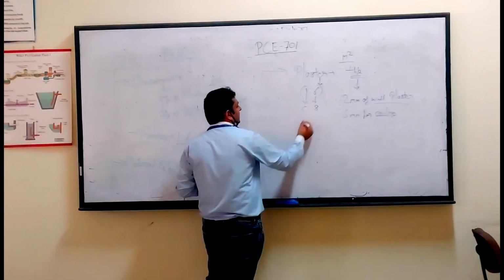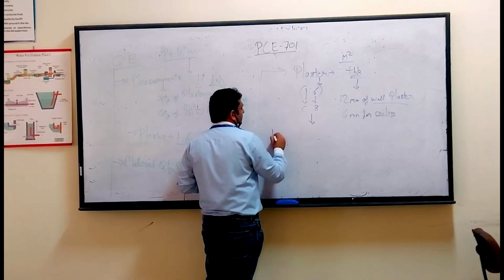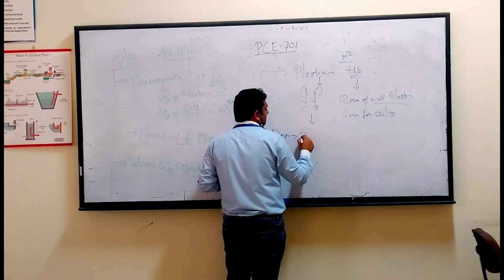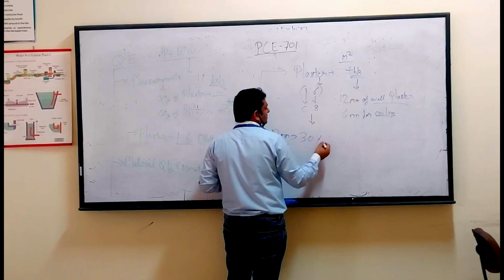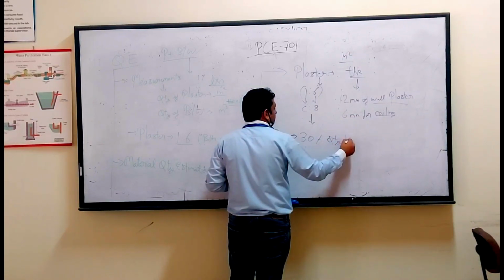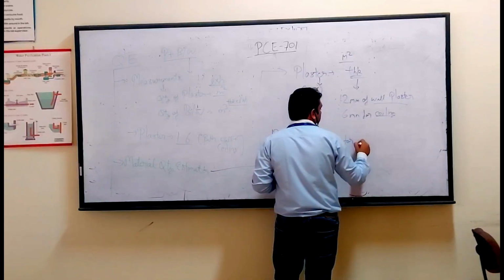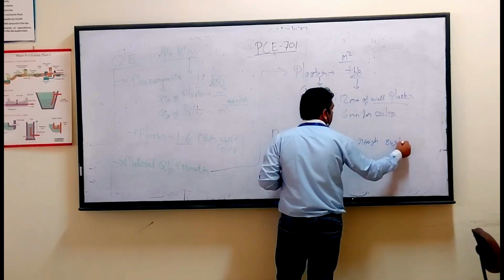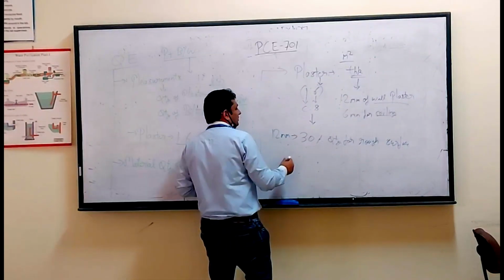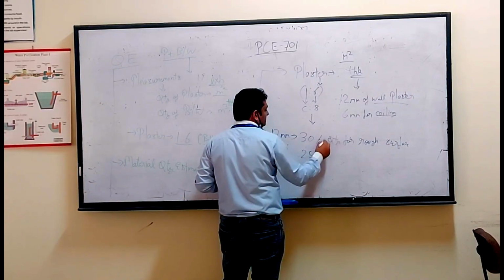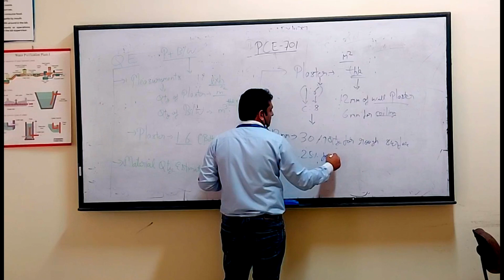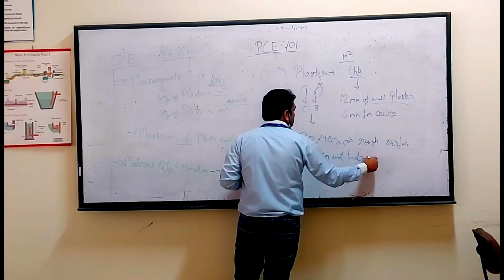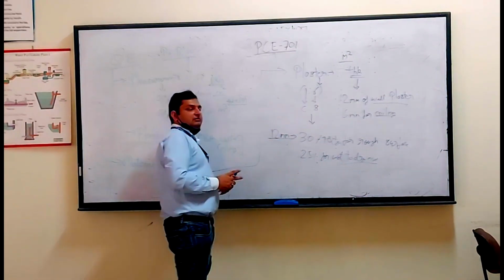Now, to get the material estimates, you have to make assumptions for the 12 mm thickness. There is a 30% increase in the quantity for filling the rough surfaces in the wall. This is the assumption you will make to calculate the quantity, and a 25% increase for the dry volume. These two assumptions will be made if you are using plaster of 12 mm.